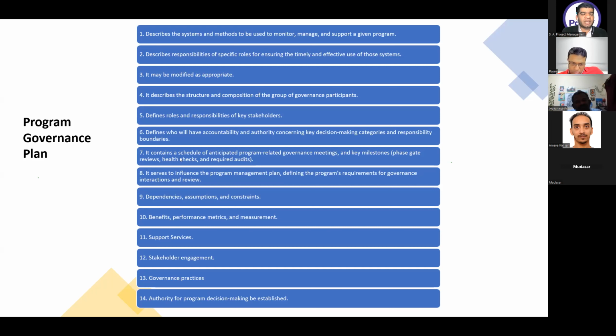Health checks mean that during the whole life cycle, the steering committee and the program manager will look at the progress of the program and make sure everything is going as per the plan. No decision will be made in the health check. You will only monitor and look into that. Normally, when the phases are long, when there's a long distance between two phases, and the program delivery phase is getting long, there's a lot of time span between the different phases,